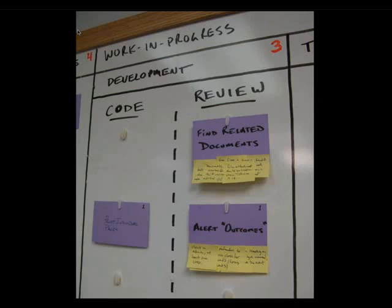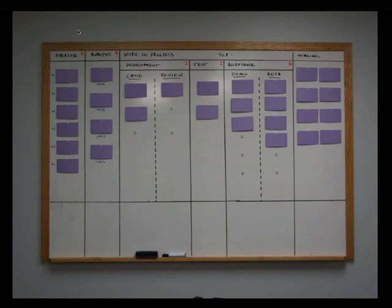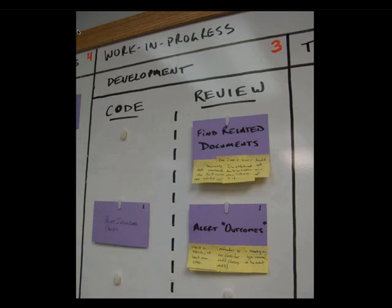Cycle time — let me go back to the Kanban board. You see this work-in-progress bar at the top that goes across several states: development, test, and acceptance. At my previous job, we measured cycle time as everything in work in progress — the time it goes into development to the date it comes out of acceptance. Lead time is the whole enchilada — from backlog, from concept to cash. Cycle time is a useful measure to understand: we've had this feature in progress for 10 days, and our average cycle time is 6 days — what are we doing wrong?